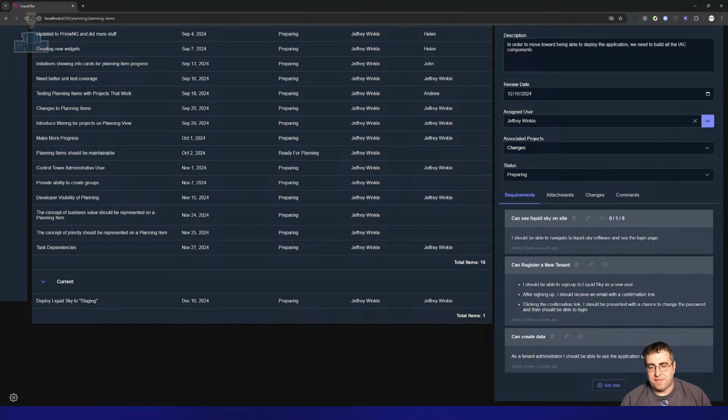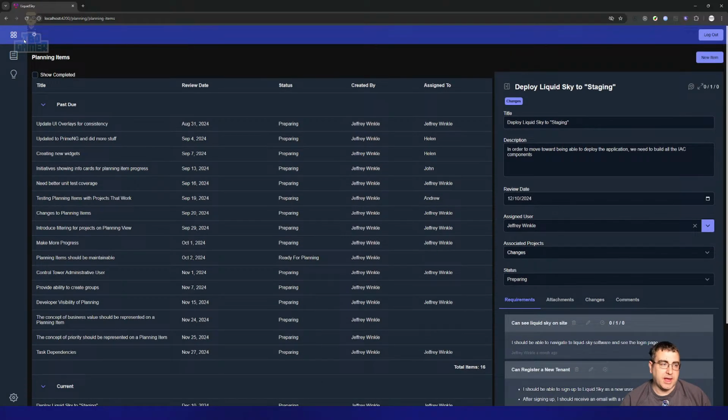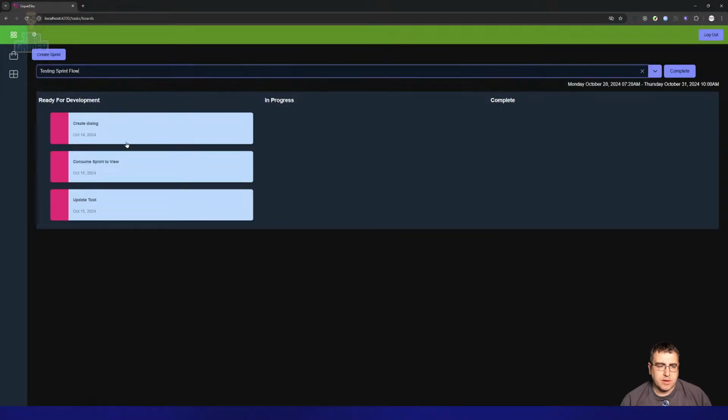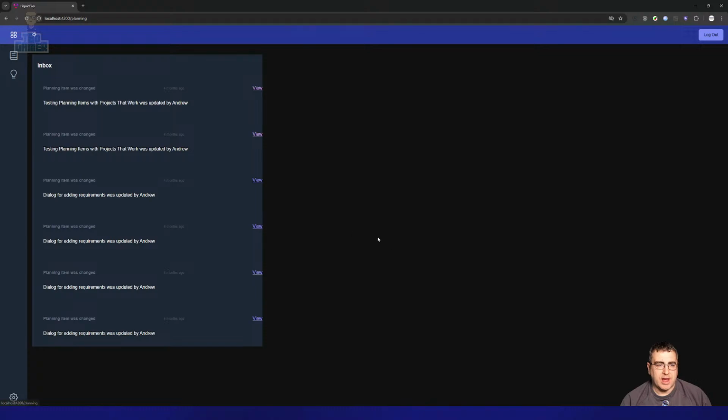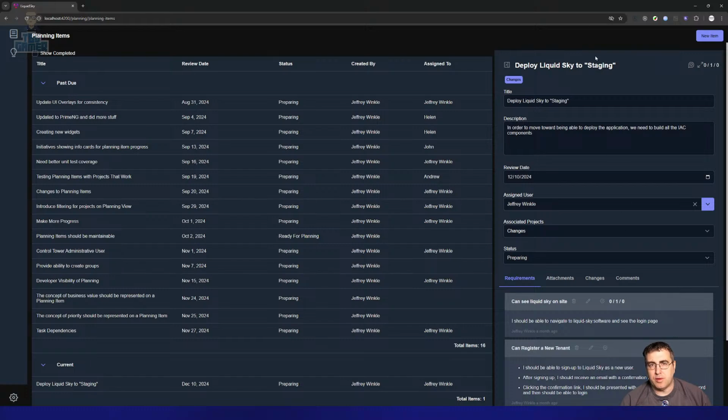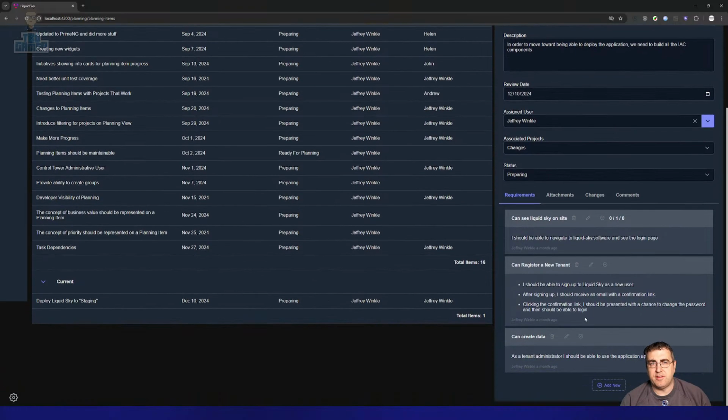And if it's stuck in, again, if the developers have finished what they need to do, all the tasks have gone over to complete, the sprint's done, etc. Should that matter that QA still has testing on it? QA could work off process, right? So a requirement could have QA tasks still outstanding. So this requirement, this planning item is not finished until QA is done on it.